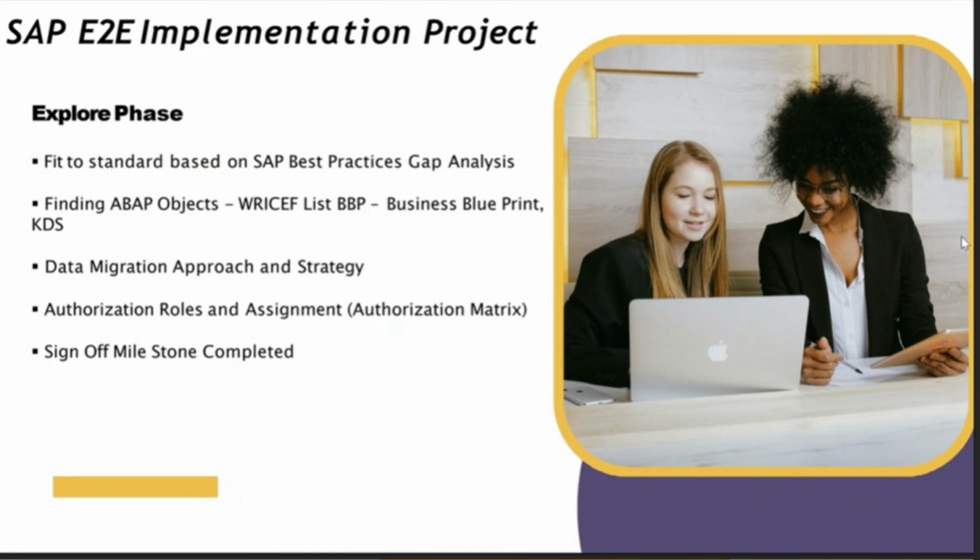So when you upload the master data or the transaction data, once your BPD is completed, once your configuration is completed, once your testing is completed, then there is a deployment phase. In this deployment phase, as a consultant, you have to upload all your master data and transaction data. Every module has master data. For example, material management: material master, vendor master, info record, source list, quota arrangement, service master, initial stock upload, open purchase order, open purchase contract. Same thing for the SD module, the PP module, the FICO module, and so on.